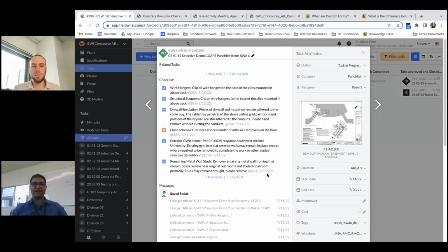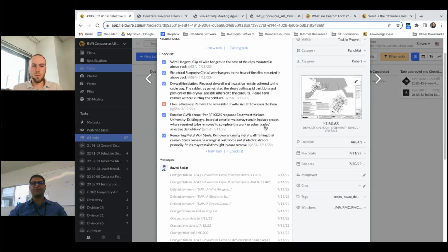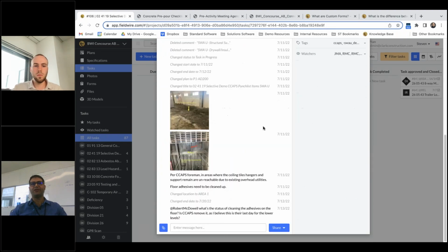And the items that are remaining, as you can see, they've been cross-marked that we would like to follow up with the subcontractor to see how they can address that issue or rectify that issue. And in the meantime, in our team, like the trade manager that we have, we shared our concern as part of the quality department to see how we can address that item before closing out this task and having the subcontractor getting demobilized.